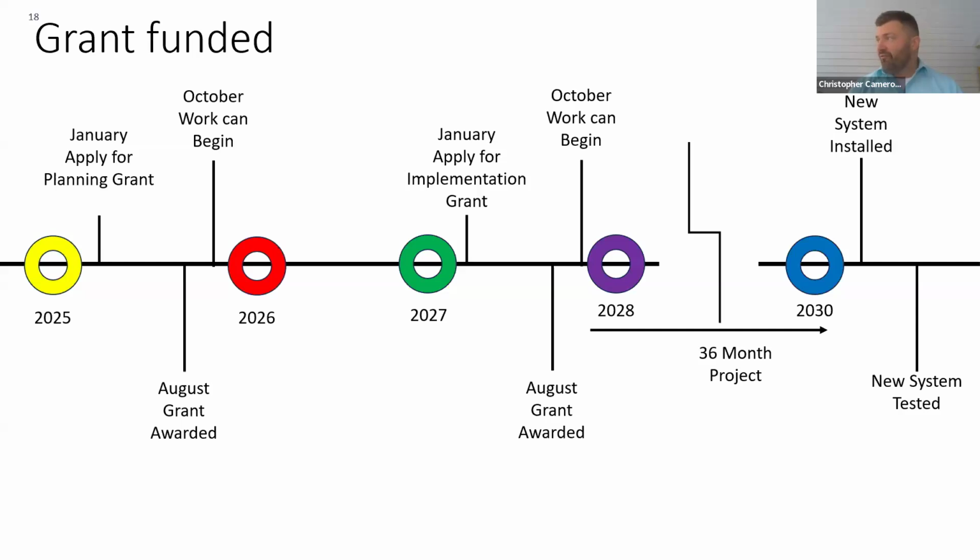As a current assistant director of facilities, I can tell you lead times on equipment are kind of unbelievable at this point. As an example, I'm working with an institution to replace doors on the front of their facility, and just these storefront doors that we ordered were a year out. So just keep in mind that 36 months is a realistic timeline.